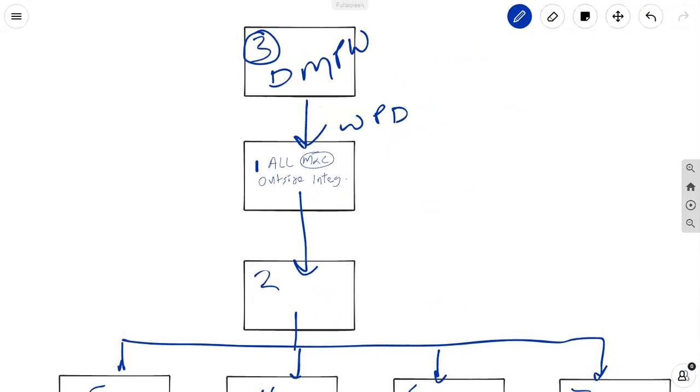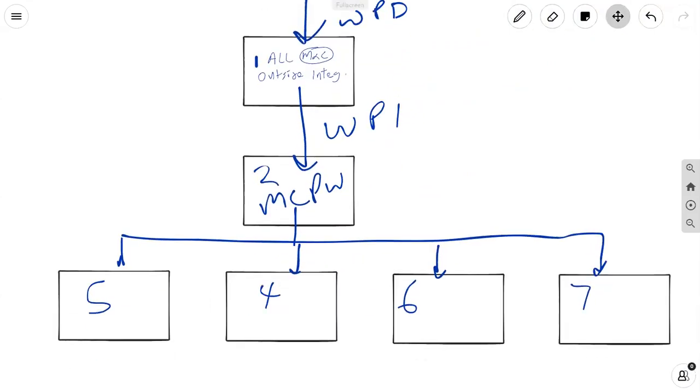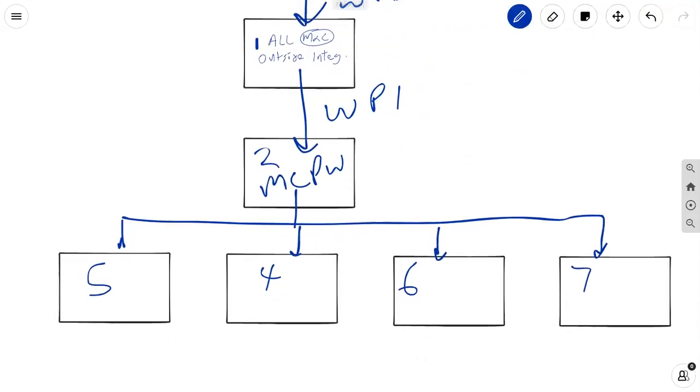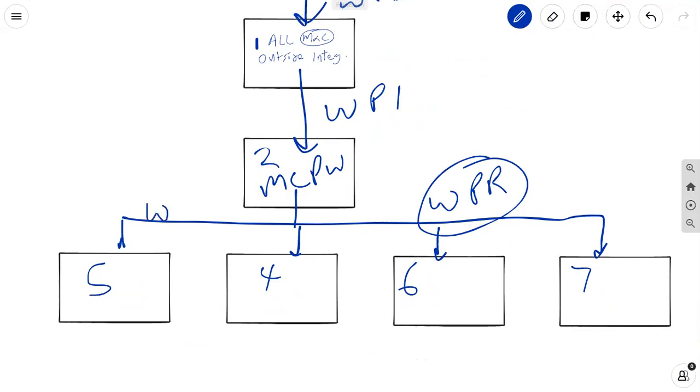From these processes, we get WPI, work performance information, and that goes into monitor and control project work. And from there, we get work performance reports, and work performance reports goes into all of these.